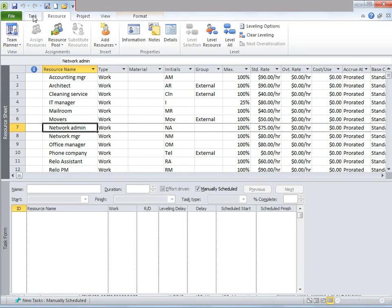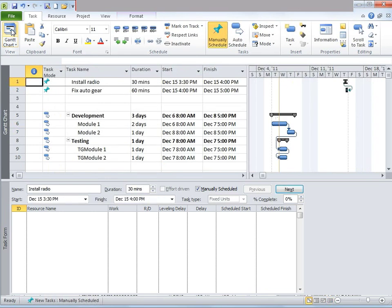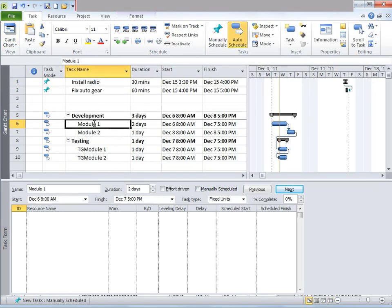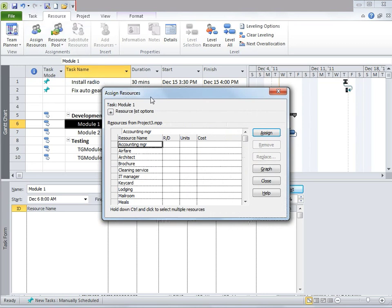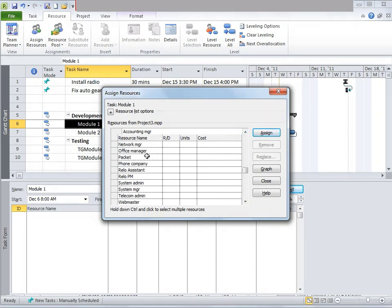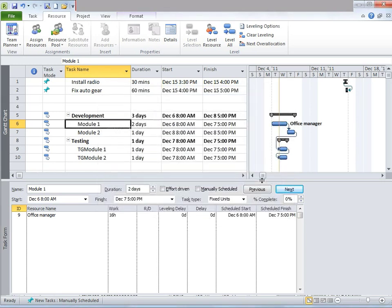Once I do that, notice all the resources have been imported to this file. Now I'm going to go back to the Gantt Chart view, and I'm going to go to Module 1. Let's say I want to assign a resource to this particular module. I'm going to click on that module, then click on Resources, and click on Assign Resources. Another window would open — this is the same window which was blank before. I'm going to select Office Manager from there and click on Assign. Then I'm going to close it.